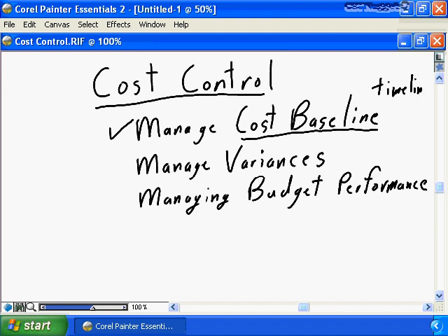As we discussed in the previous nugget, you can be in as much trouble as a project manager, and I've been there, let me tell you, delivering the project on budget but not meeting the cash flow analysis, surprising the accounting department with a bill for $20 or $30 or $50,000 in a month where the cash reserves and the cash management plan wasn't in place, simply because you accelerated the project, simply because you brought in an expense to your project a month or 2 or 3 months earlier than the original cash flow plan.